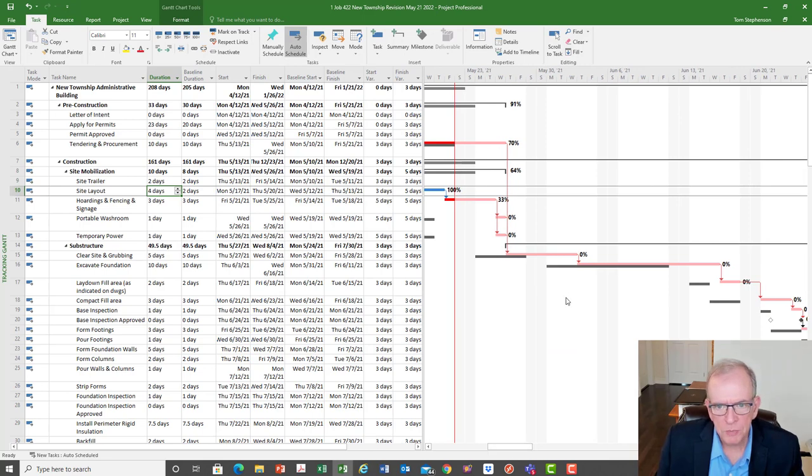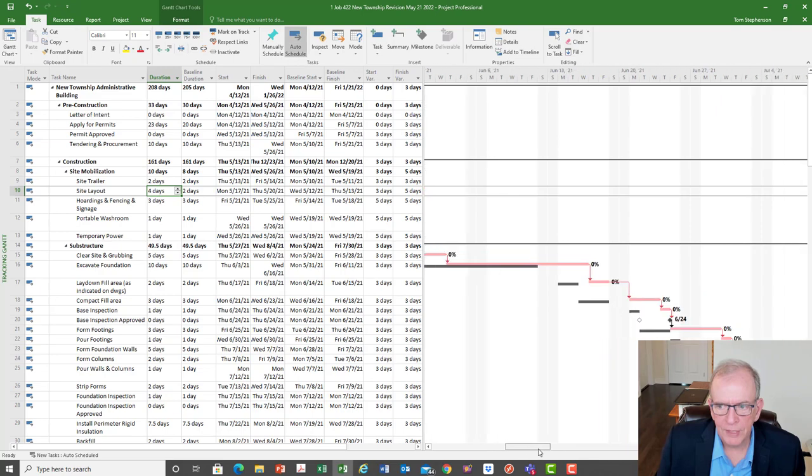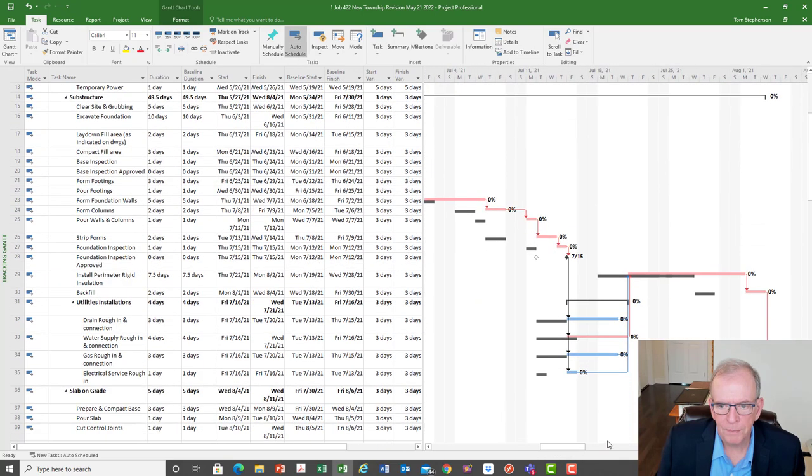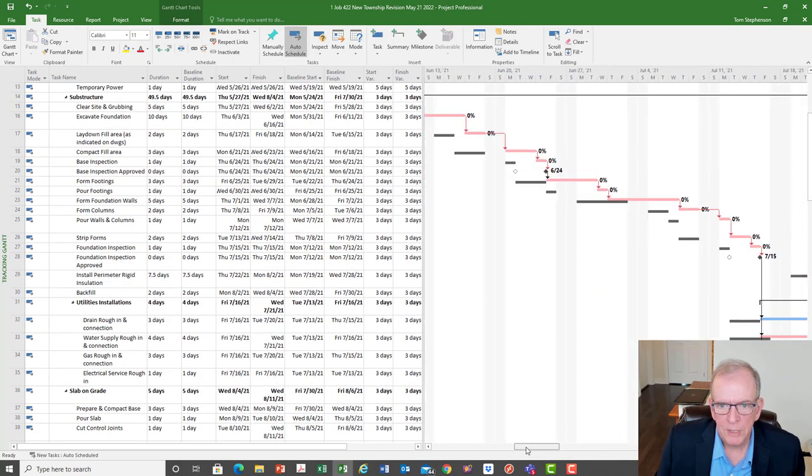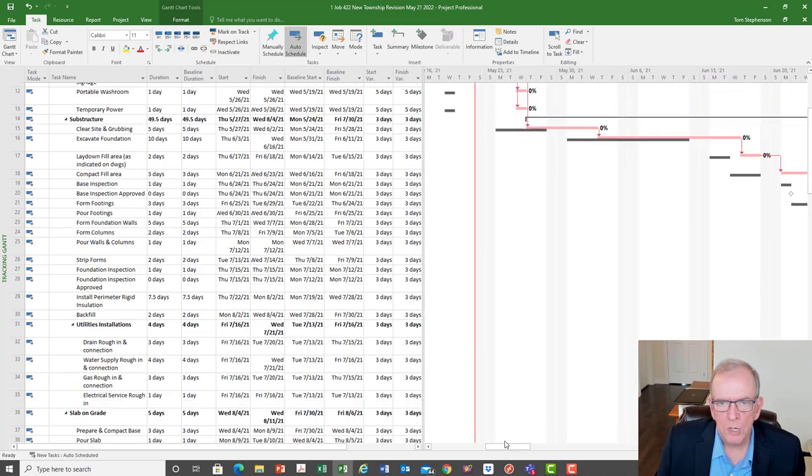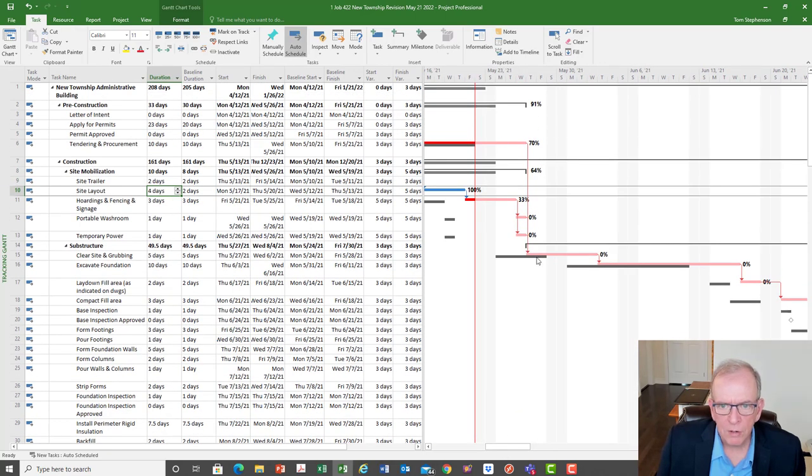And in project management terms, I use what we call the direct method that I kind of created. The direct method means we detect along the critical path, right? In this case, I've got everything red, so that's not too creative there until you get further down in the project. Then you get a bunch of stuff with float. But the idea is you detect along the critical path first. You try to fix whatever the problem is sooner rather than later. So the D is detect along the critical path.